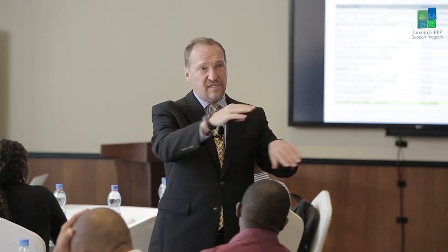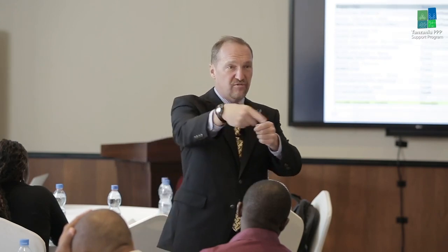Actually, they're doing a large number of road PPPs. They're doing this on an availability payment basis. Another word for that is annuity payment. Essentially, they're telling a private partner, here's an existing road, heavily traveled. We want you to expand it and widen it, add new lanes for 100 kilometers and more, and maintain it. Key output standards are things like the pavement condition and the roughness of the road, but you have to meet all the maintenance standards, and we will pay you for 10 years, a 10-year annuity payment.